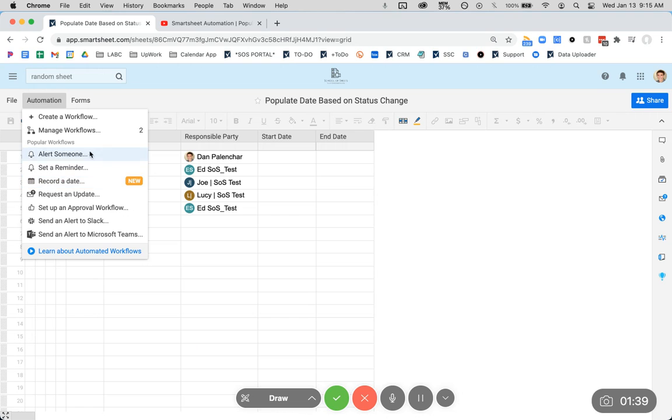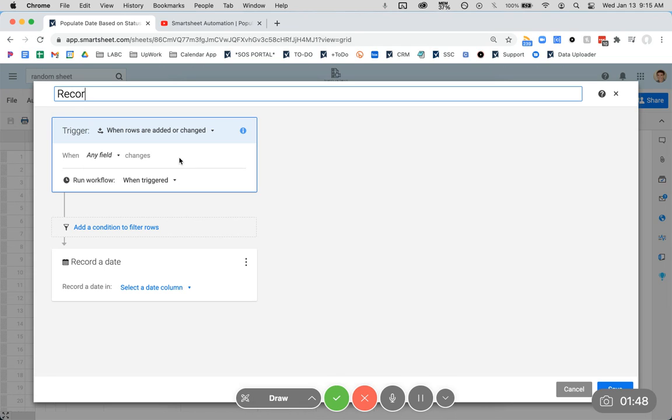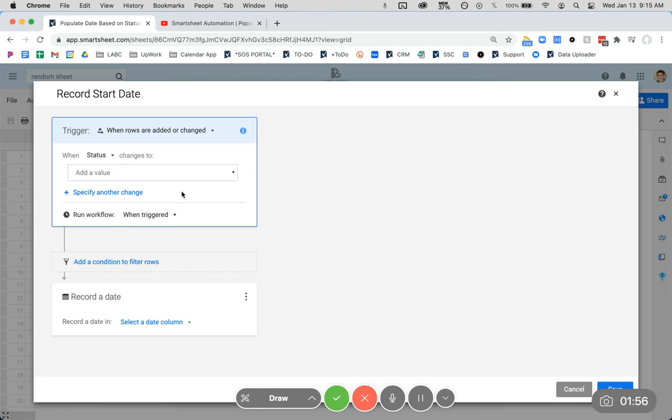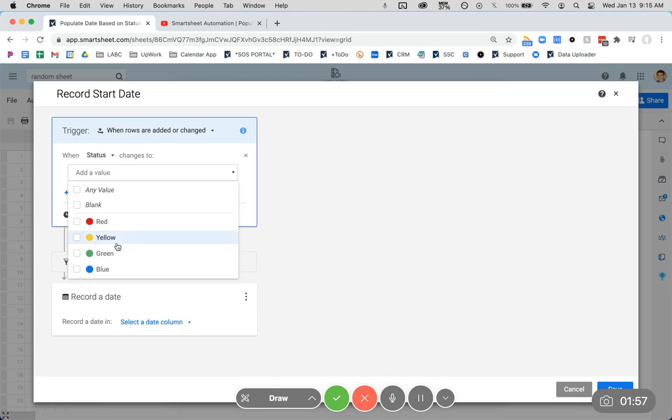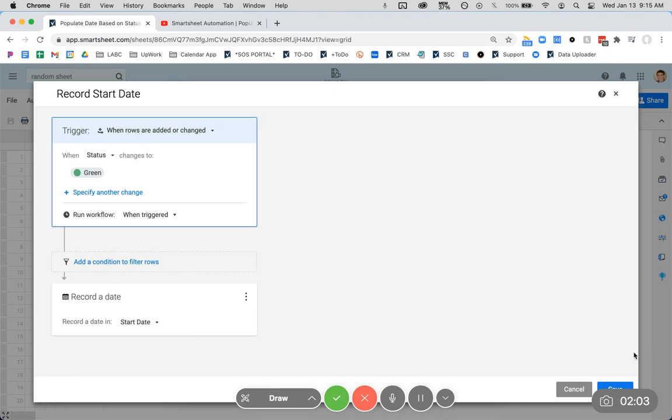So let's just do it the easy way. To set this up, go to automation, record a date. For this one, let's record start date. Trigger when rows are edited or changed, this will work just fine. And our use case is the status is going to be changed to green and that is going to record the date in the start date column. Pretty simple.